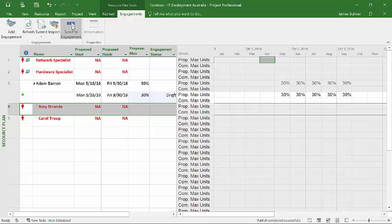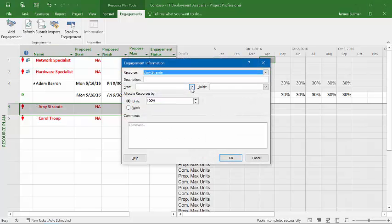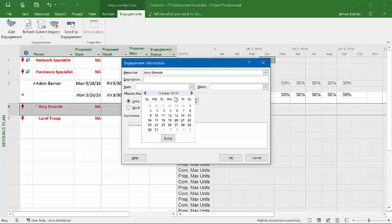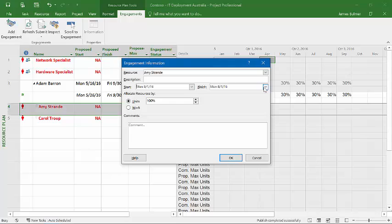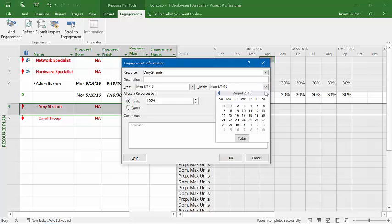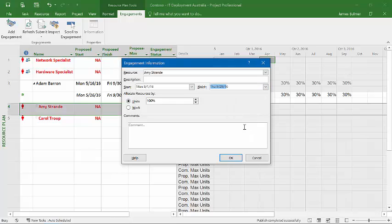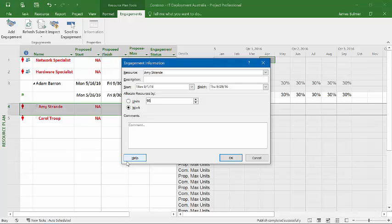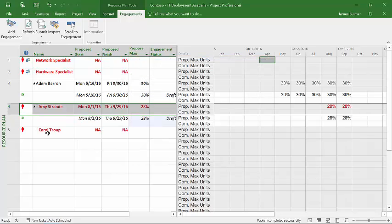Just to show you I can also add an engagement for Amy. And again, I simply define when I need Amy. And let's say that I need Amy from the 1st of August to the end of September. But in this particular case, I'm going to have Amy do 95 hours of work as opposed to working a certain percentage of time. I know based on experience that she can get all this work done in 95 hours and so therefore I do that.